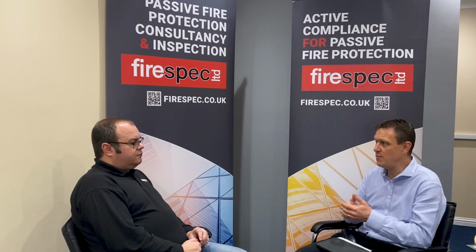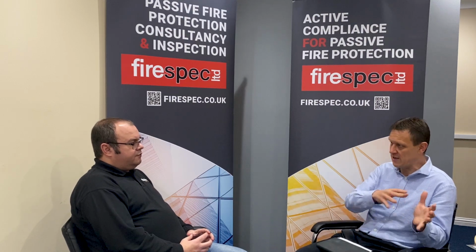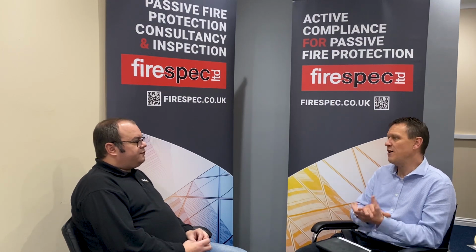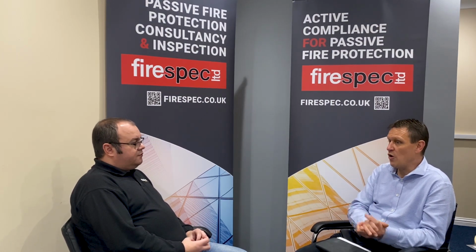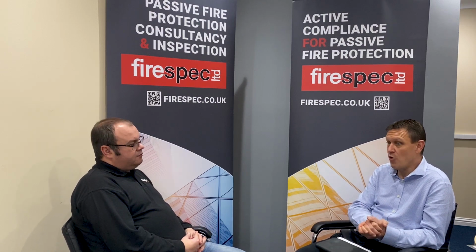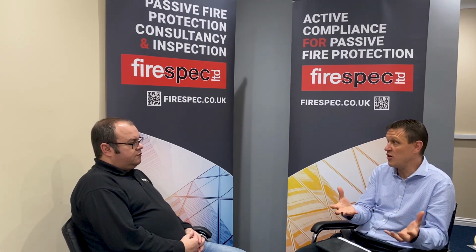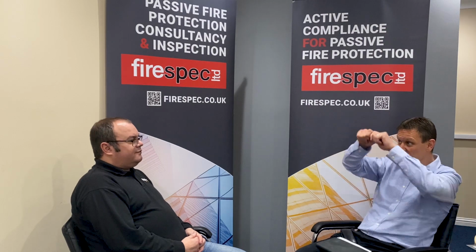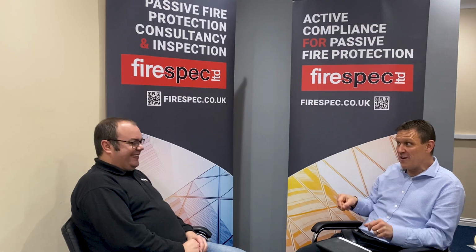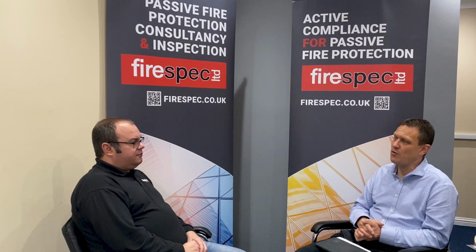All our guys are trained, through a rigid process, to make sure of exactly what needs to go in the design process. The builder's work needs to be right, the service distribution needs to be right. This is how to get a good compliant install. We would usually always ask to do some destructive testing. You've touched on destructive testing. It's really important that we engage with the project managers and their clients and say, look, we need to do some destructive testing, because fire stopping looks good when you finish it. You can put the masking tape round, and it's all nice and solid and white, and then we'll look at that nice black high pressure mastic. But when you open up, sometimes we find non-compliance.